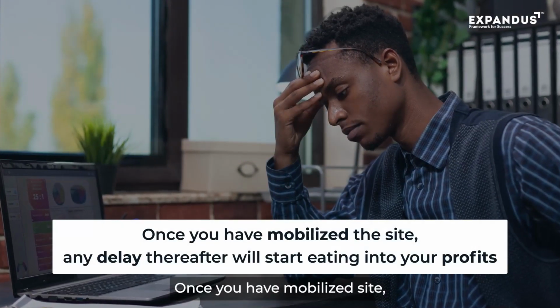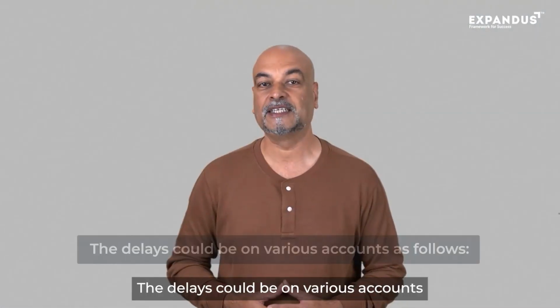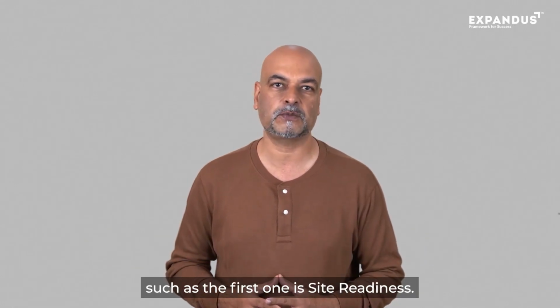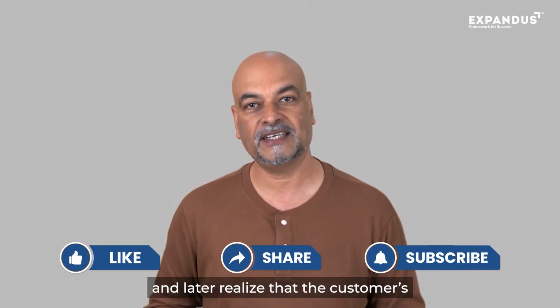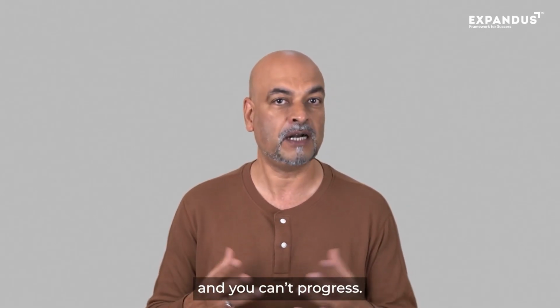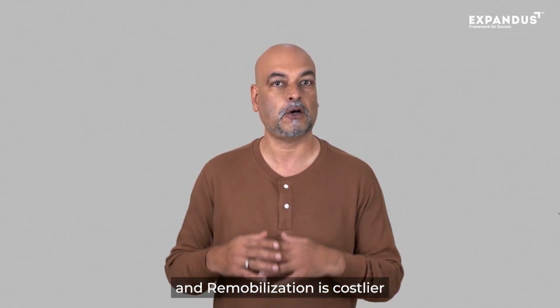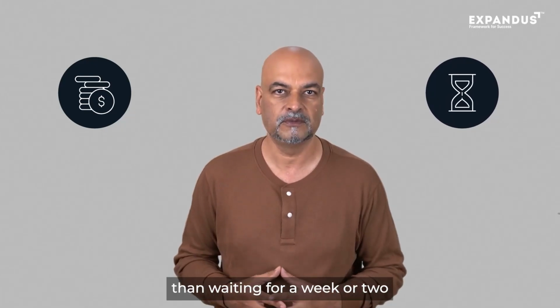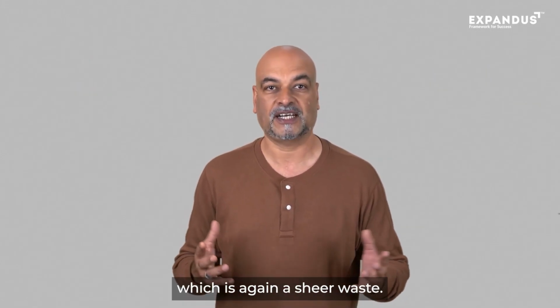Once you have mobilized site, any delay thereafter will start eating into your profits. The delays could be on various accounts. The first one is site readiness. We mobilize site with all manpower and tools and tackles, etc., and later realize that the customer's civil foundations are not ready, or their utilities such as water, power, compressed air, etc. are not ready, and you can't progress. Sometimes demobilization and remobilization is costlier than waiting for a week or two, wherein the man hours and expenses are still continuing, which is again a sheer waste.